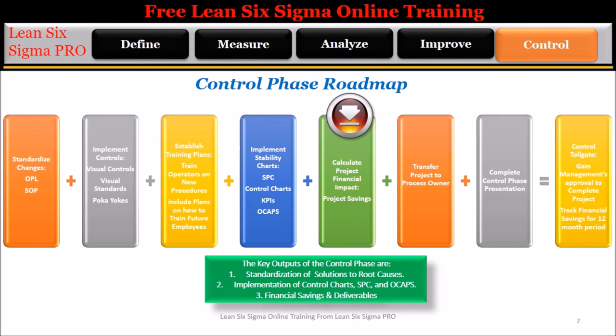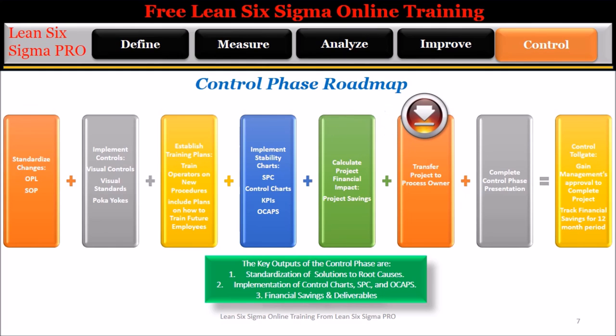Step 5: Calculate the financial savings for the project and verify whether the team has satisfied the customer's expectations. Step 6: Transfer the project to the process owner.